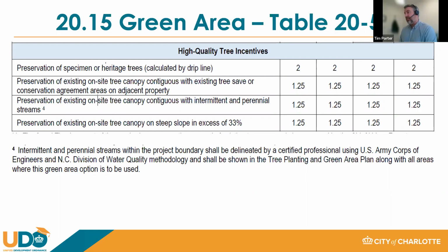That's new for everybody. But I will say, in the new regulatory areas, the infill residential single lot stuff, which is on an occurrence level of thousands of permits per year versus hundreds, those are intended to be very, very quick reviews and inspections. We're talking about sub 30-minute reviews, in some cases sub 20-minute reviews. So the occurrence rate's going to be high. There'll be a lot of time put into those, but we're really trying to be expedient to make sure that from a customer perspective, we are not holding things up, that we cover all the bases. So I don't expect a significant increase.